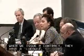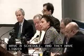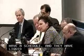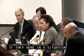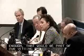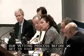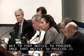No, as Michael explained, when we bid a contract, when we issue that notice to proceed, the contractor has to begin, and they have a schedule that has generally liquidated damages that provide for delay damages payable to us in the event that they were late. So if they were in a situation where they couldn't start fast enough or had a different problem, that would be part of our vetting process before we get to that notice to proceed. But once that notice to proceed is issued, they start, and they have a schedule in the contract to complete the work. Thank you, sister.